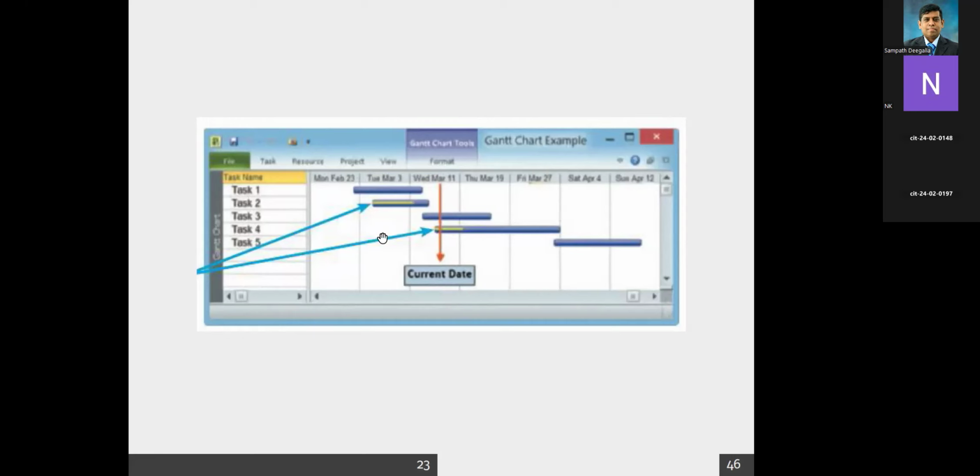So what you notice is only 2 cases, it's already started. You see there's a yellow line here, which manually identifies this one. And that's what we are going to use. So here you can see that task 2 started, but it couldn't finish. So ideally, we expect it to be finished here. Similarly, if you look at task 4, it goes beyond. This is the current place. And you can see that task 4 has already started.